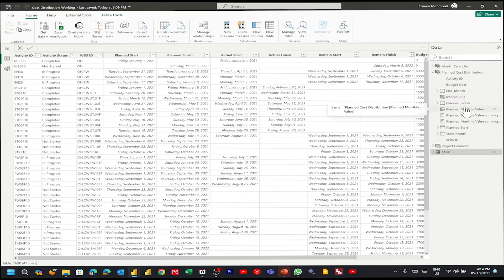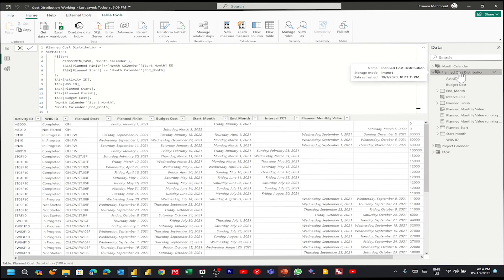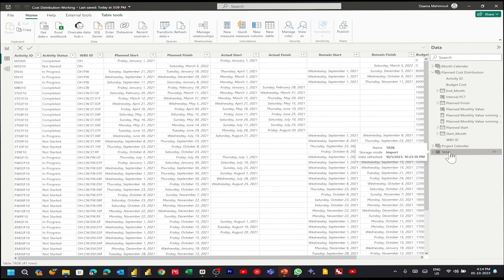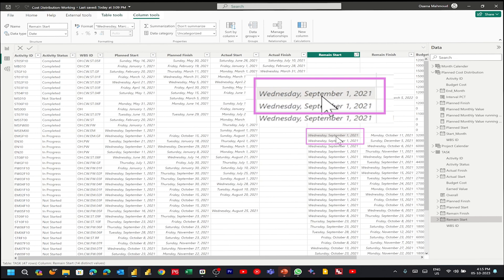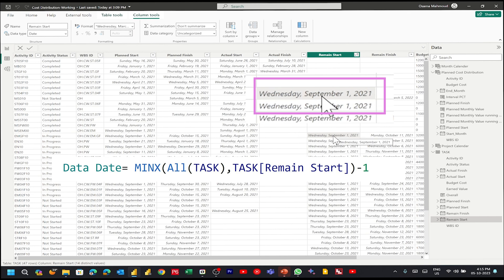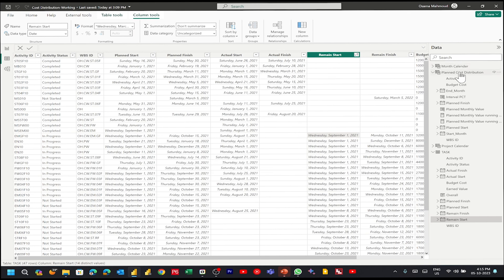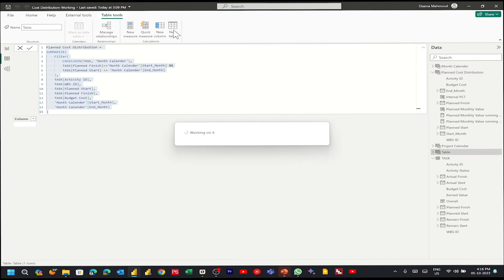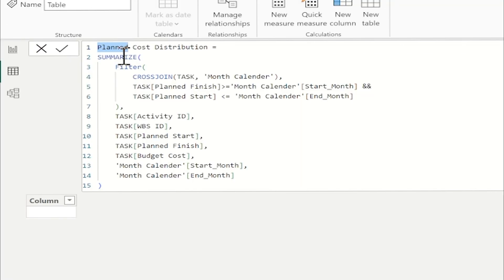Now let's create the earned value cost distribution. Before that, I want to define the data date. I'll go to the task table, since the exported file from Primavera doesn't contain this information. If I sort the remaining start ascending, the minimum date is 1st of September. From Primavera I know the data date is end of August, so the data date will be the minimum of remaining start in the task table minus 1. Now let's go to the planned cost distribution DAX and take a copy. I'll create a new table and paste.